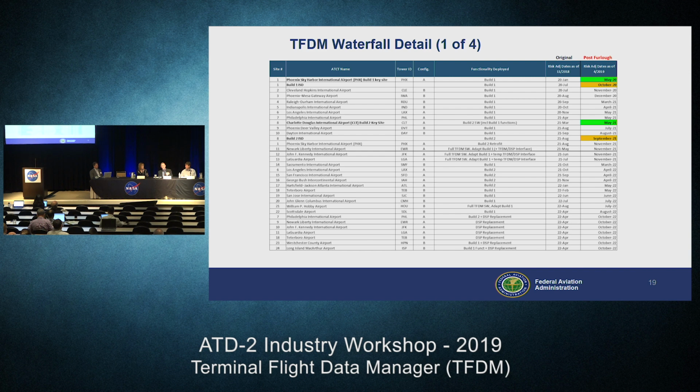But we also have to have other support capabilities in place. I have to have a second level engineering support capability, operational, which is at the technical center, and the folks that are going to be providing second level engineering support have to be trained and have the tools and capabilities to support the systems in the NAS. I also have to have a depot set up, which we've got a depot system installed, and we're buying all the spares that we need to support the system for the life cycle. So all those things that support the system for 20 years after we deploy it have to be in place by October 2020, or I'm not going to any other site.